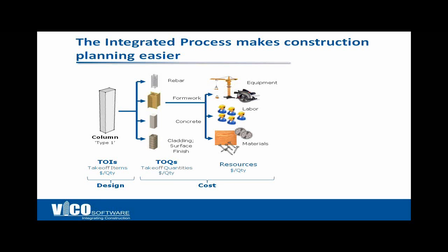And then further, and you don't always go this detailed or this deep early on, but many of our customers are doing this earlier and earlier, because once you've built a database, this is really quite easy to do. They're able to size out the crews, the shifts, the equipment, and all the raw material that will be needed by the subcontractors or the teams. From there, you work with the superintendent or the scheduler to sequence the project.